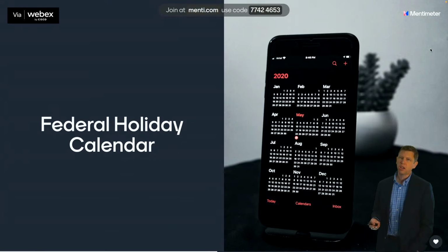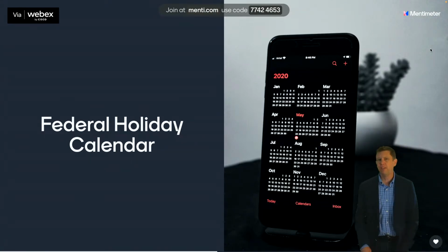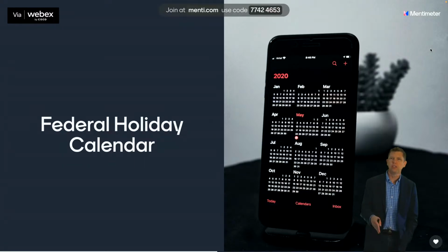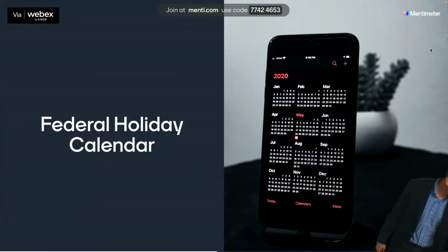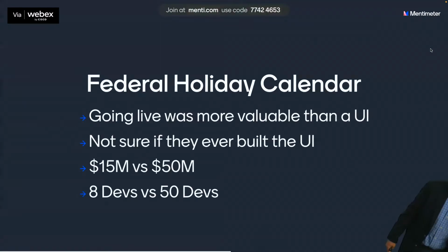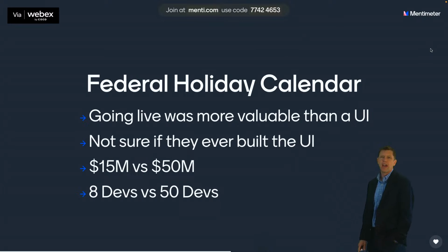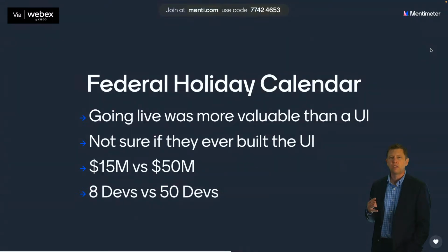But when we started talking to them about, is this actually MVP? Is there any way we could start using this without having that? They said, no, it's not actually MVP. And the customers decided that going live was more valuable than having a user interface to do this. And I'm not even sure if they ever built the user interface, because what they decided is, we can just do this in Excel and just upload it straight into the database.